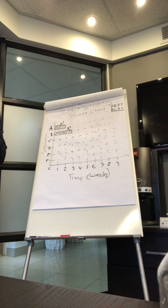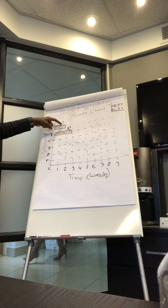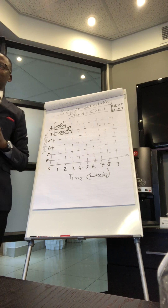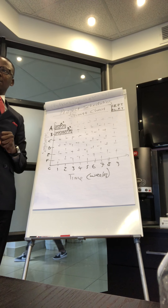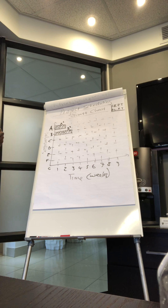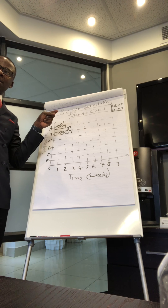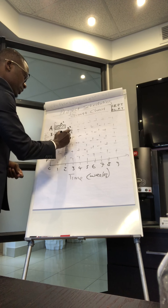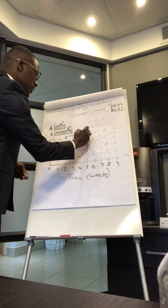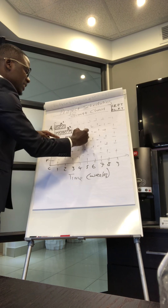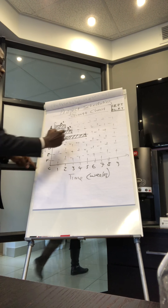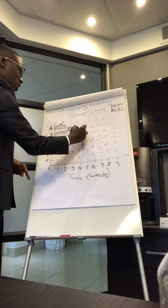Now it gets a bit interesting. Activity C is the kind of activity which cannot start until A is finished, and it takes three weeks. Since it depends on Activity A to finish, the bar will start at week two — where A ends — and then we take three weeks from there. So this is Activity C depending on A, taking three weeks.